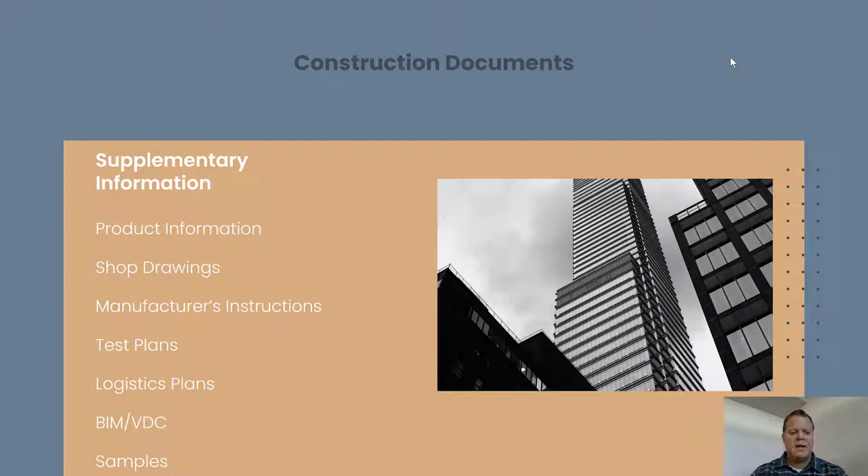And then have logistics plans down there. This is typically prepared by the general contractor or some other subcontractors, and it could range from things like how we're going to organize the site to how access in and out for different materials, how to organize the inside of the building for both material moving in, staging, and trash out. So this is the basics of a logistics plan.